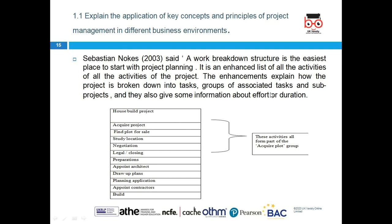Work Breakdown Structure (WBS) is an approach in project management — the easiest place to start project planning. It is a list of all the activities required in the project, showing how the project is broken down into tasks. For example, to build a house: acquire the plot, find a plot for sale, study the location, negotiations, legal and closing, appointment of the architect, draw the plan, planning application, appoint the contractor, and start building.